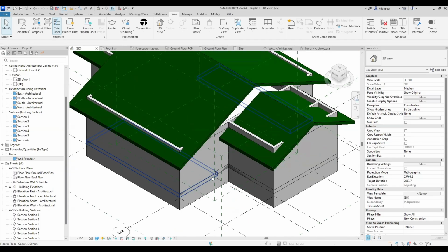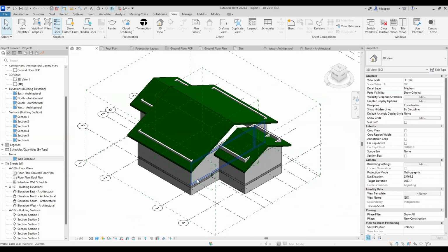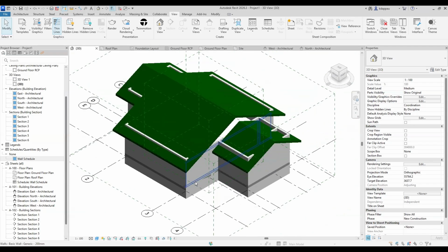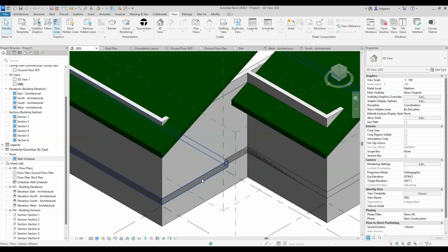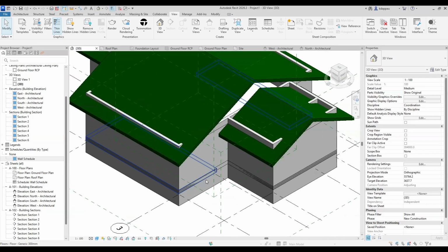Expensive. So assuming that you are going to do a cladding and you need 6,000 square meters, and the contractor submits to you that the cladding is going to be about 18,000 square meters, more than triple, then the person is going to cheat on you and then take your money and go away. But if you're able to do your schedule and then know the total area of cladding you need, the volume of concrete you need, the number of blocks you need, the number of paint buckets you need to paint the building, then nobody can steal from you.